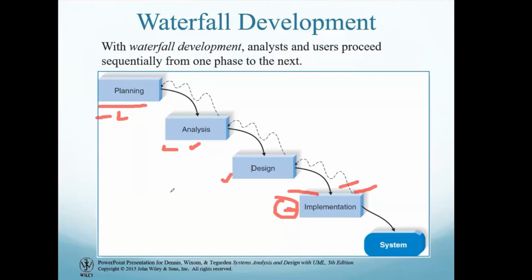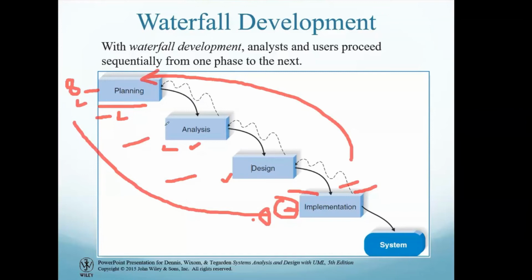And note this point, that this planning phase will take months. If the project is big, it may take 6 months, it may even take 1 year if it is a very big project. But let's suppose a few months or a few weeks here, and a few months or a few weeks here, depending on the size of the project. So after a few months, if you go back from here, there is a big time gap between planning and implementation. Sometimes you will not even remember what the organization told you, because due to the few months' delay, maybe you forgot many things. This is the drawback of this system: if any new change is needed, you will have to go back, and the gap between the phases is too much.